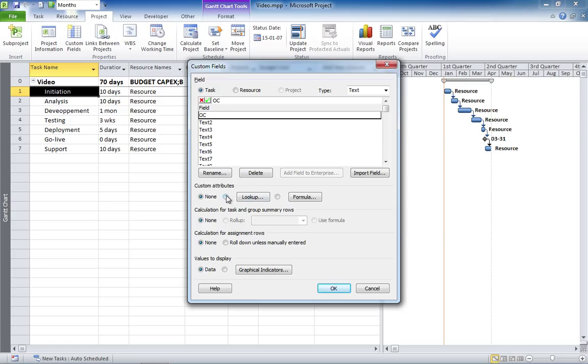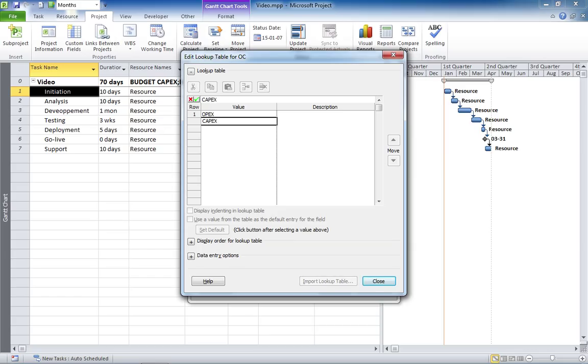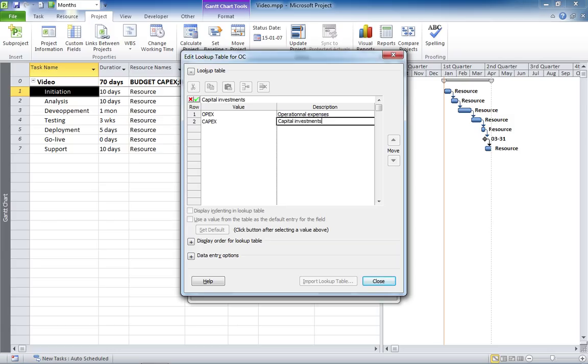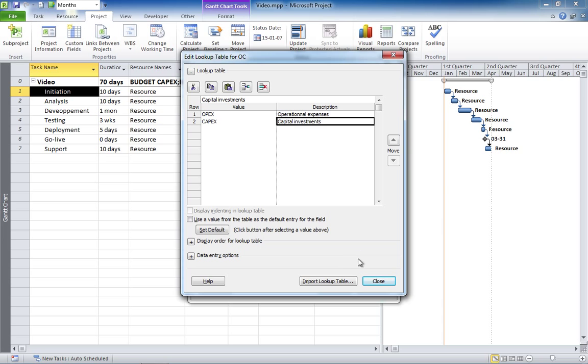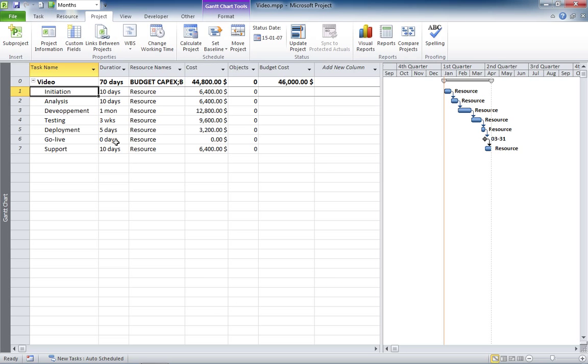So, we're going to create a lookup table for that. So, you can only put either the value OPEX or the value CAPEX on this field. We're going to put a description. So, operational expenses for OPEX and capital investment for CAPEX. And that's it. We need to roll down this field to the assignment here.